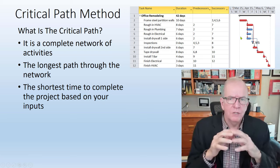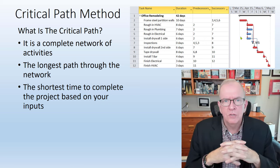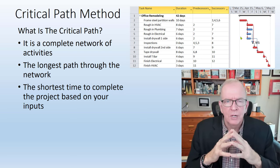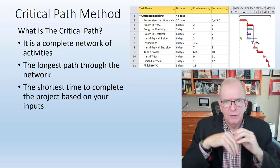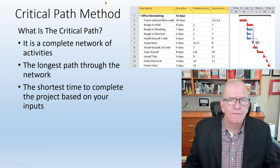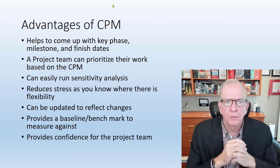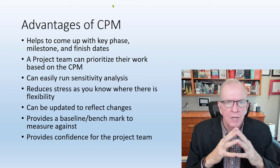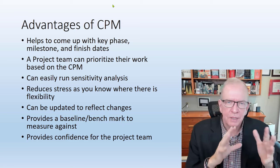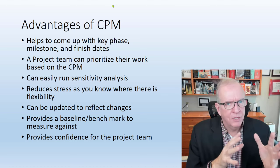So it's very helpful because you've got this big project and you're thinking, where do I start? You start by breaking it down — a work breakdown structure — breaking those components into further components, figuring out durations and sequencing. It's got a lot of advantages. And don't worry, we're going to talk about disadvantages too, because I'm also a proponent of lean construction methodology. Lean construction methodology is not such a huge fan of the critical path. I don't think the critical path is all bad, but I don't think it's all good either.